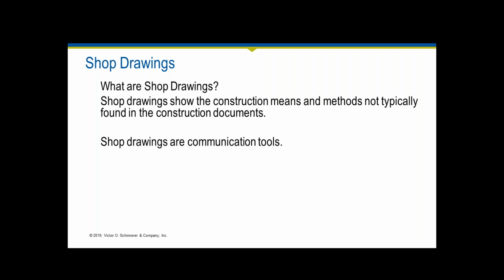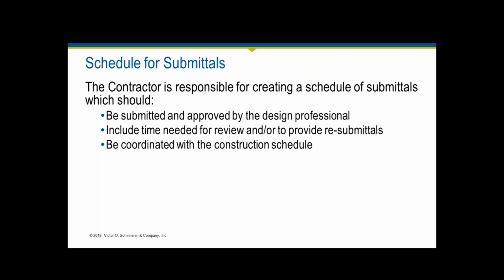So the thing to realize from a management standpoint is that you need to understand, okay, here are the submittals that we require, but for this to make sense, because you're providing services, you need to be able to say, what does the schedule look like and how does that work in with my planned work so that I know when to expect these submittals.